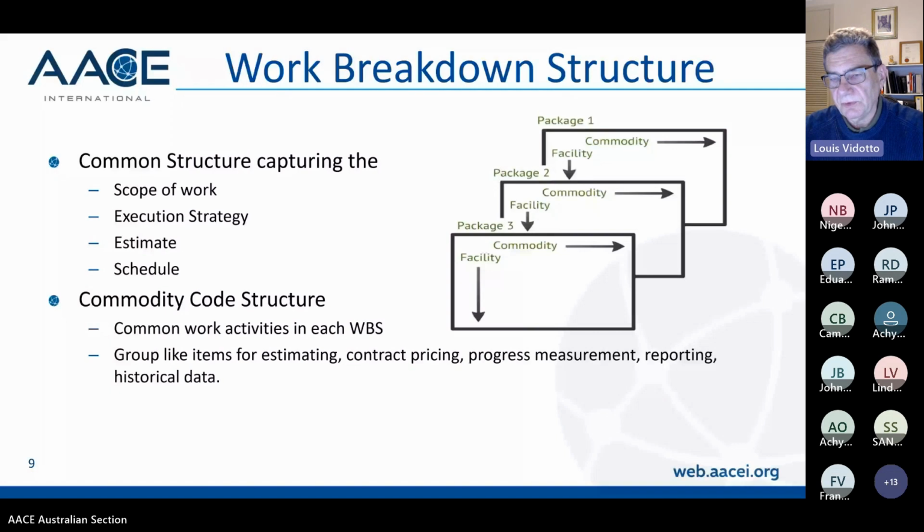with the estimate reviews. We always, when we're reviewing estimates, the first thing we do is review the quantification, and we go through with the project engineers and just say, have we captured the scope of the study or the project? Have we reflected what the intent of the quantities that you've developed for the project? And then secondary to that is then reviewing the cost of that work. First thing is capture the scope. Make sure you've captured the scope.